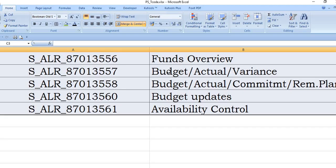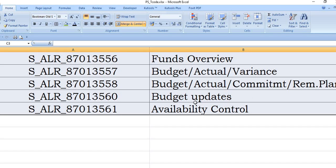And these are the general standard transaction codes: S_ALR. These are the transaction codes you can note down for your summary and save in your favorite list. Fund overview budget actual variance, budget actual commitment and reminder planning. For this you can get the budget updates in your project, and for this transaction code you can get the availability control.